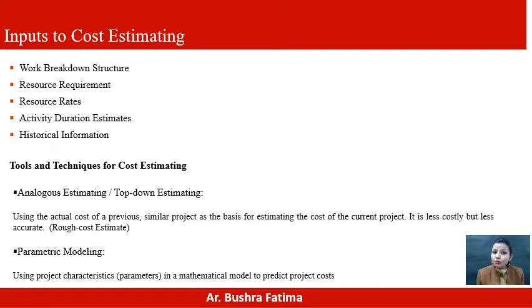purpose. You must know when a particular activity is going to be finished. When you study time management, you know the earliest time and the finishing time, which we discuss further. After knowing the same, you can calculate the cost incurred. Maybe for your project something needs to be purchased, and you must know the timing for this purchasing. For resourcing, you may require some machinery or equipment, so you know the timing for this purchasing. In other words, you must know when this material is really required for the project.